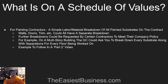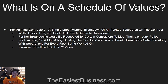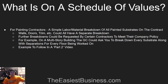Further breakdowns than that could be requested by certain contractors to meet company policy — it all depends on what GC you work for, because every GC is different and requires different information on their schedule of values. For example, if you're doing a large multi-story building and you're painting walls, doors, and trim on five floors, they may want a walls, doors, and trim breakdown for every single floor.